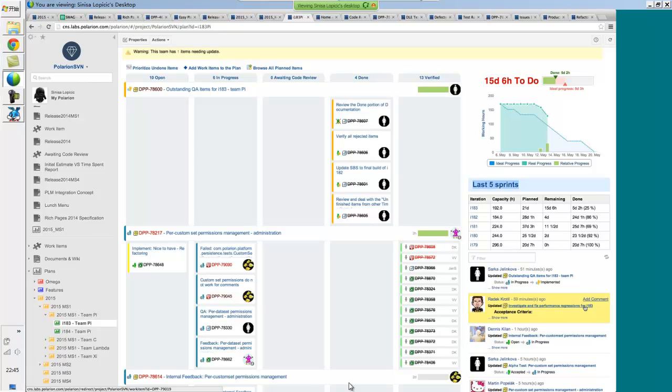Capacities. So capacities we use mainly just for reference, just to give us some idea of how many people are available to the sprint. The reason for that is because, again, we have cultural holidays, people have holidays, and there are different things that happen during the sprint. So this is basically to outline what we actually expect of team completeness to be during the sprint. So when we do have a planning meeting, we first collect the capacities of the team, where we ask the team how many days they're going to be working, if anybody's taking holidays, if anything extraordinary is happening. And based on that, we try to conclude the capacities.